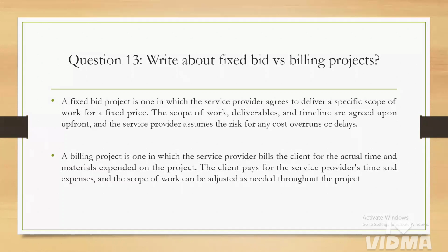Mr. Anand gave the project, to complete it within 8 months, and he gave a budget of around 1 crore. So this company will be the most responsible and will have more risk. This vendor company, Adino, needs to work on this project with fixed things like price, timeline, and requirements, and they need to work according to what the client has given.